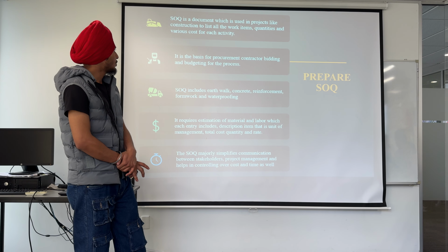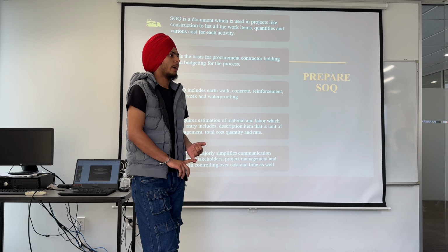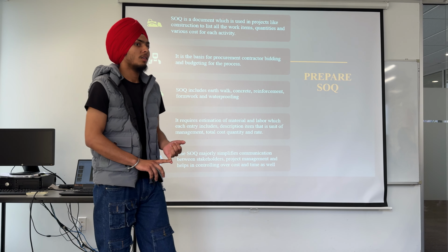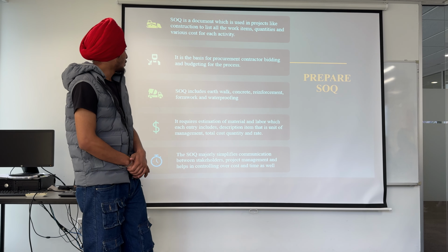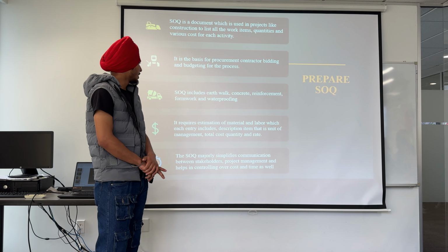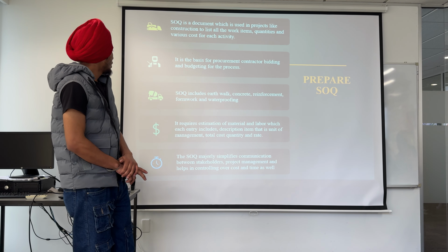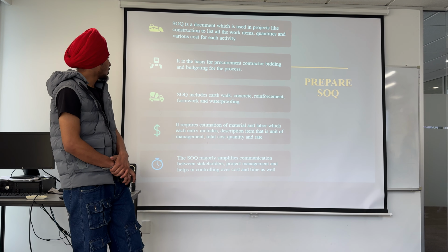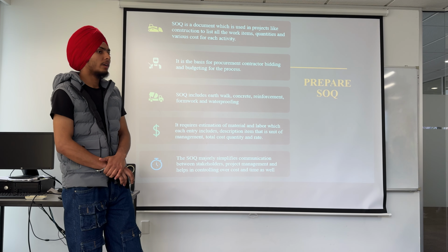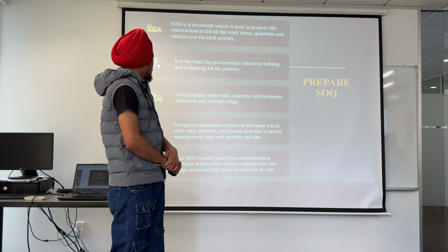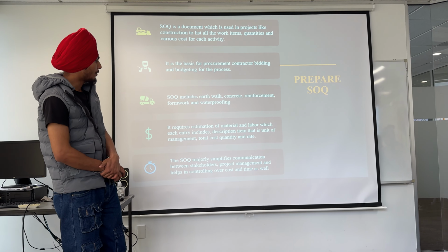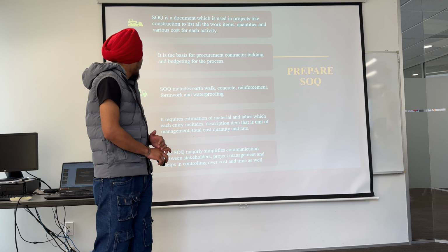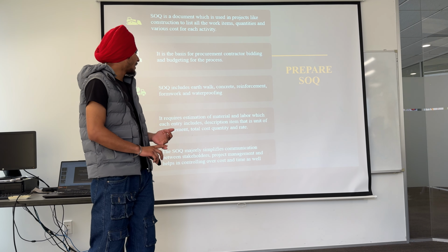SOQ include earthworks, concrete, reinforcement, formwork and waterproofing, as well as backfilling. It requires estimation of materials and labor, where each entry includes description of item, that is unit of measurement, total cost, quantity and rate. The last one is the SOQ majorly simplifies communication between stakeholders and project management, and helps in controlling over cost and time as well.